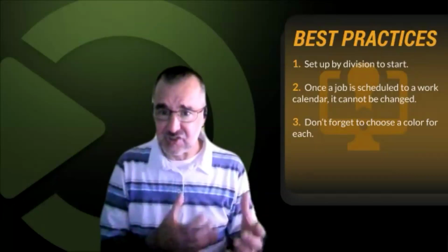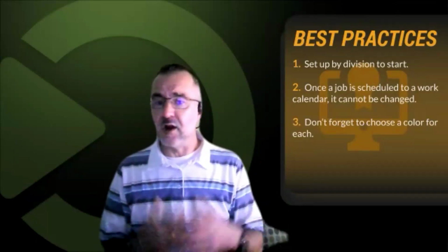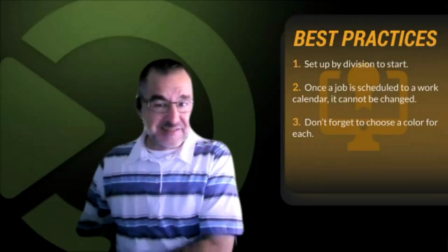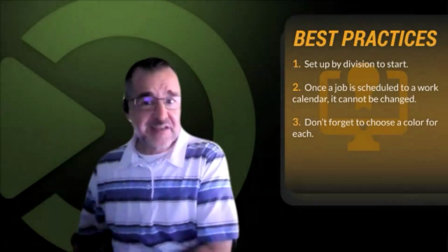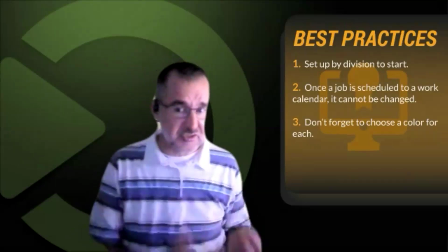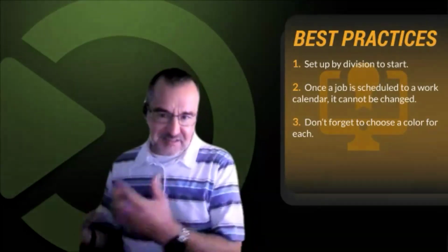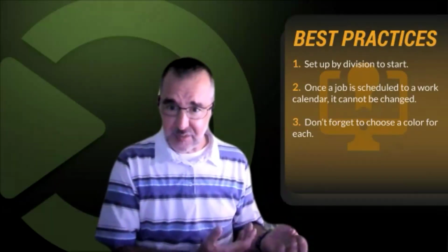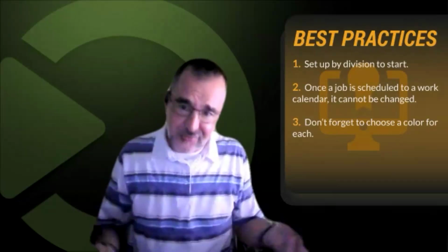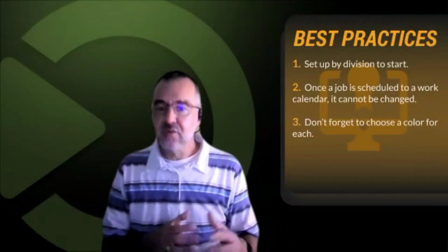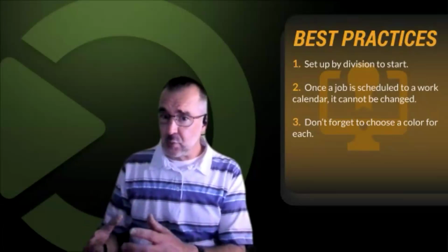What we mean by once a job is scheduled to a work calendar, it cannot be changed, is basically if I take a maintenance job like mowing or bed maintenance or a fert application, and I schedule it onto a design build calendar, that's going to probably give you guys some problems. And that one cannot simply be moved over to another work calendar. You would need to delete that job and then reschedule it appropriately. So when you learn about scheduling maintenance work a little bit later on, then you'll know how to do that.